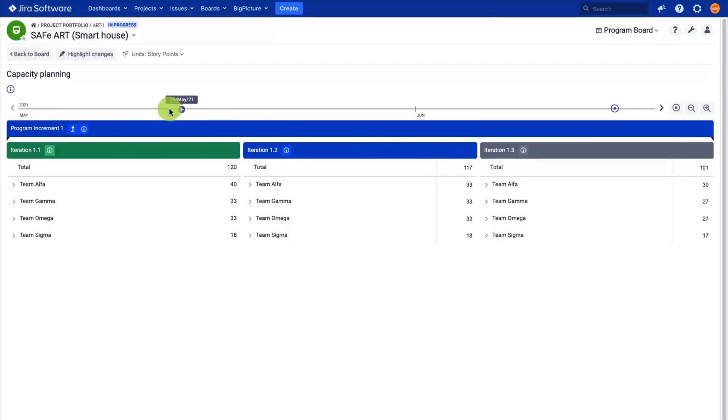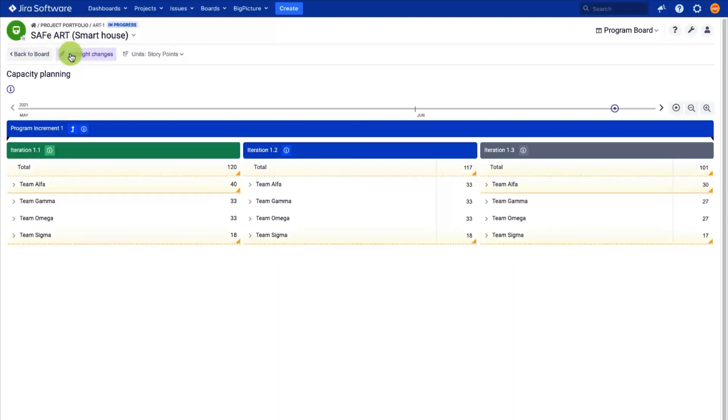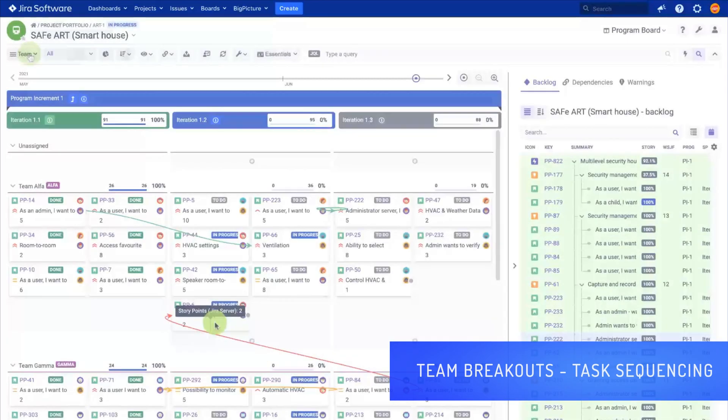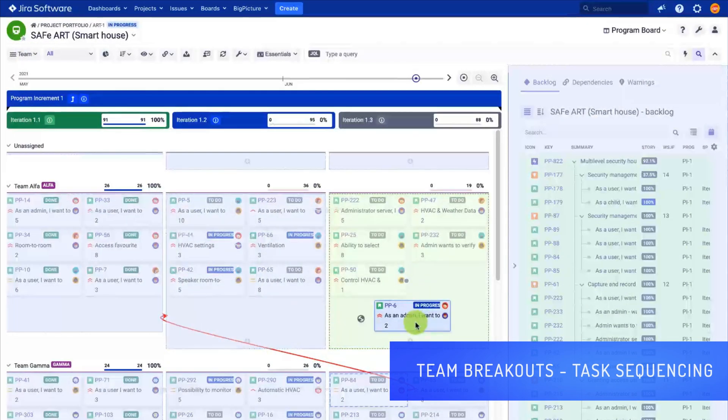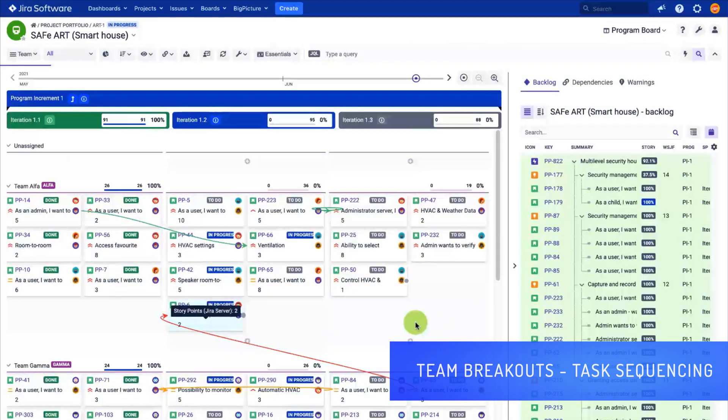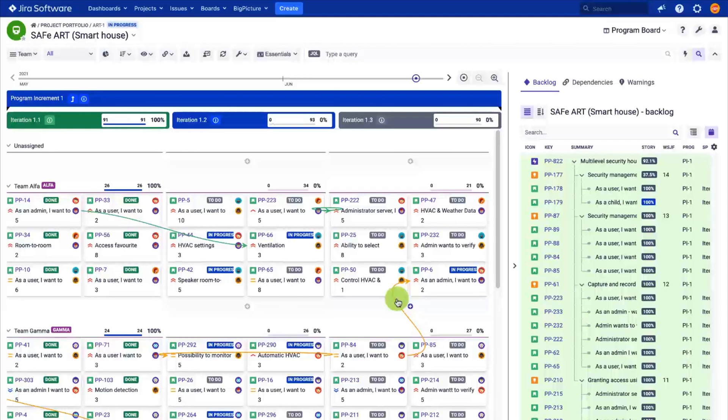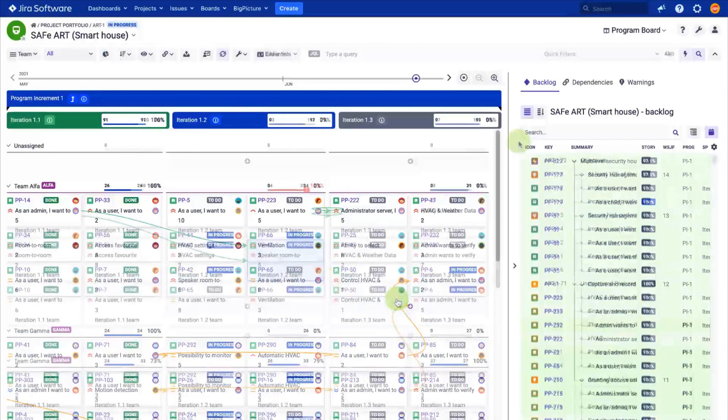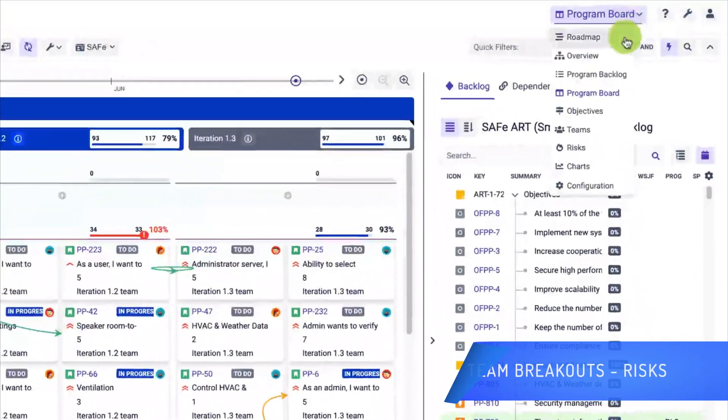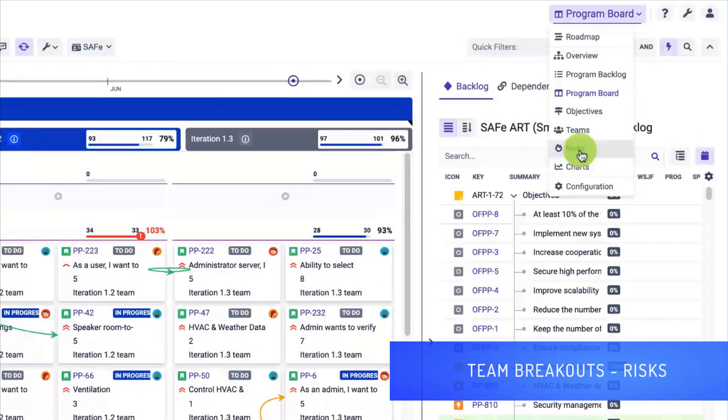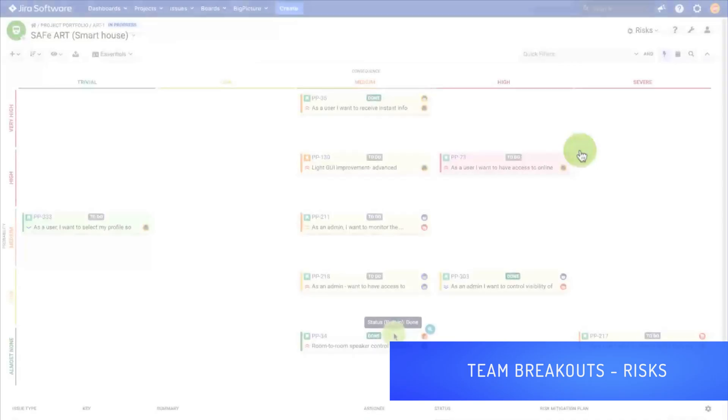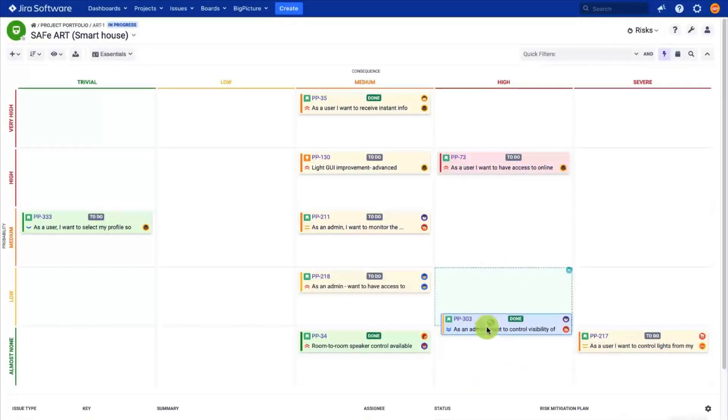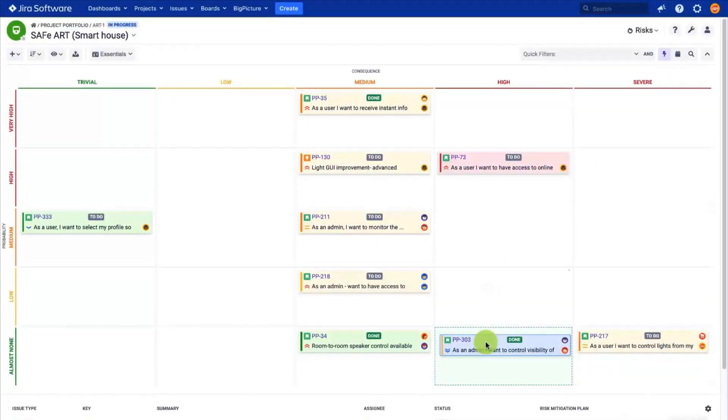The program board module, aka board, will visualize the dependencies so that you can easily spot items which are not sequenced correctly. Here you need to do two things: sequence the work by resolving the incorrect dependencies colored red, and make sure that you do not exceed the team's capacity.